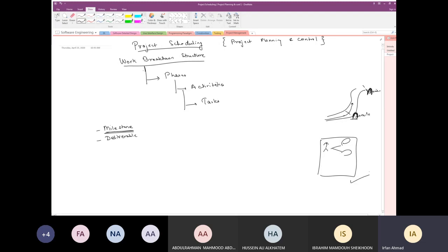But let's say you completed it. Of course, completed is in a relative sense, because there's always a possibility of change. But as of now, with the current knowledge you have, nothing is left. You have covered all the requirements. You have done the description and the diagram. Once you complete it, this can become a milestone. So these are milestones: the end of a task, which gives you a clear indication of your progress.